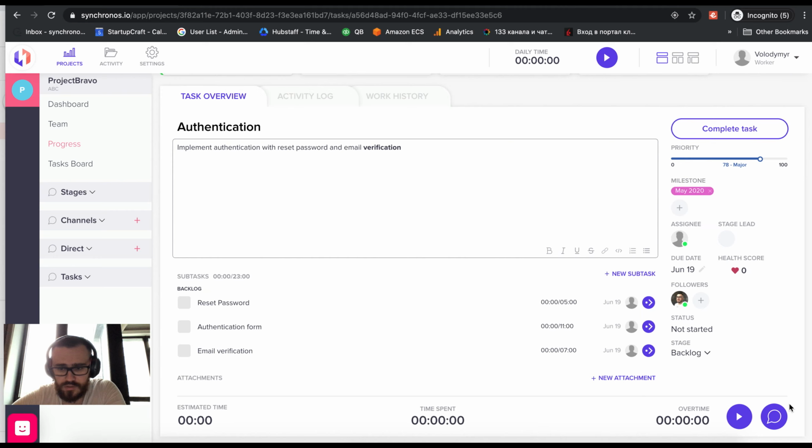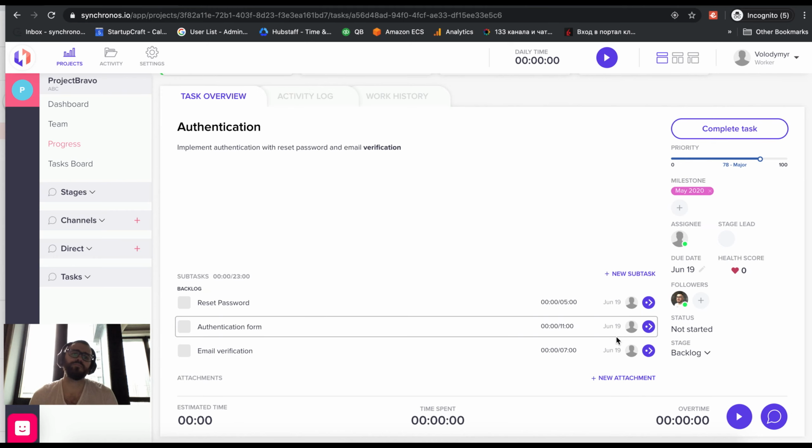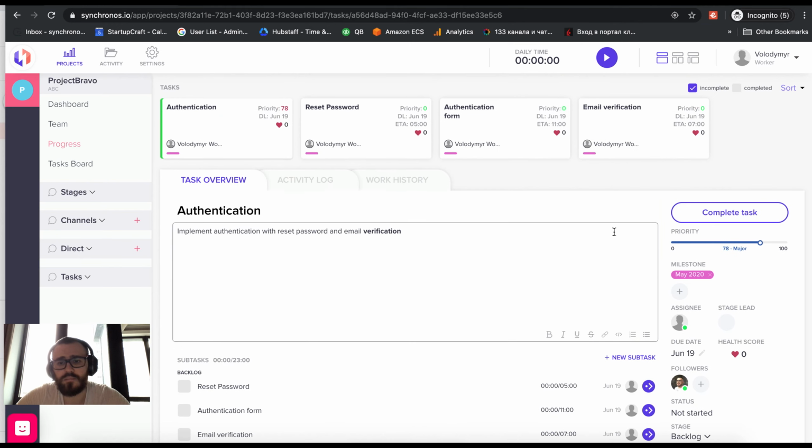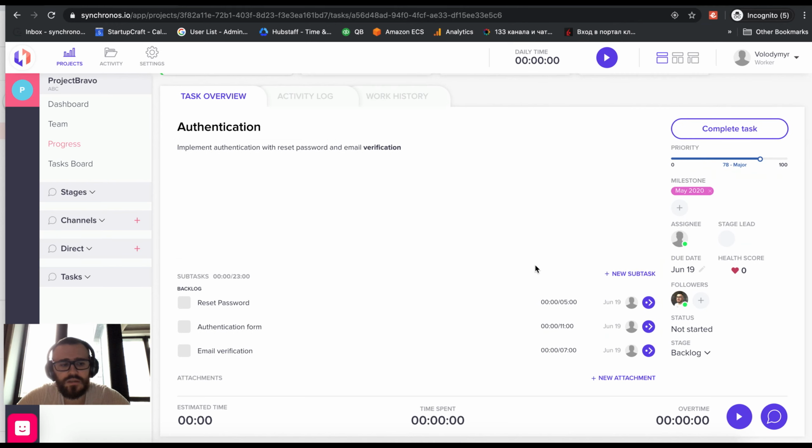Because there's time that your worker is going to spend on the task. You want to have the pure experience. You want to track purely this time so you can understand how much time is spent per specific task, no matter that you talk or whatever. But there is also general time, like they start their working day, chat with their colleagues, discussing some problems on a general level, whatever. And it's better not to track per task in this way.